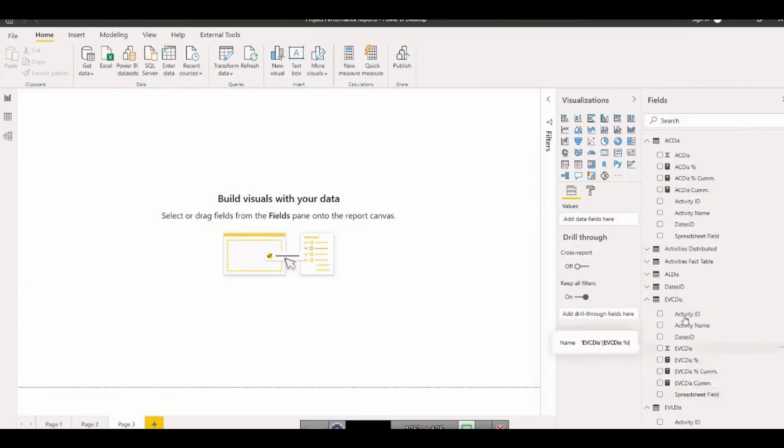But I always prefer to have them in earned value, so that I know that if my SPI cost is required, it is in earned value. I will put the name of the table, so it will bring the data for me. So all the parameters, whether it's a CPI, SPI, schedule variance, cost variance, and estimated completion, all will be coming here. So you can choose where you want to put, but need to put them in one table, so at least you know the location.